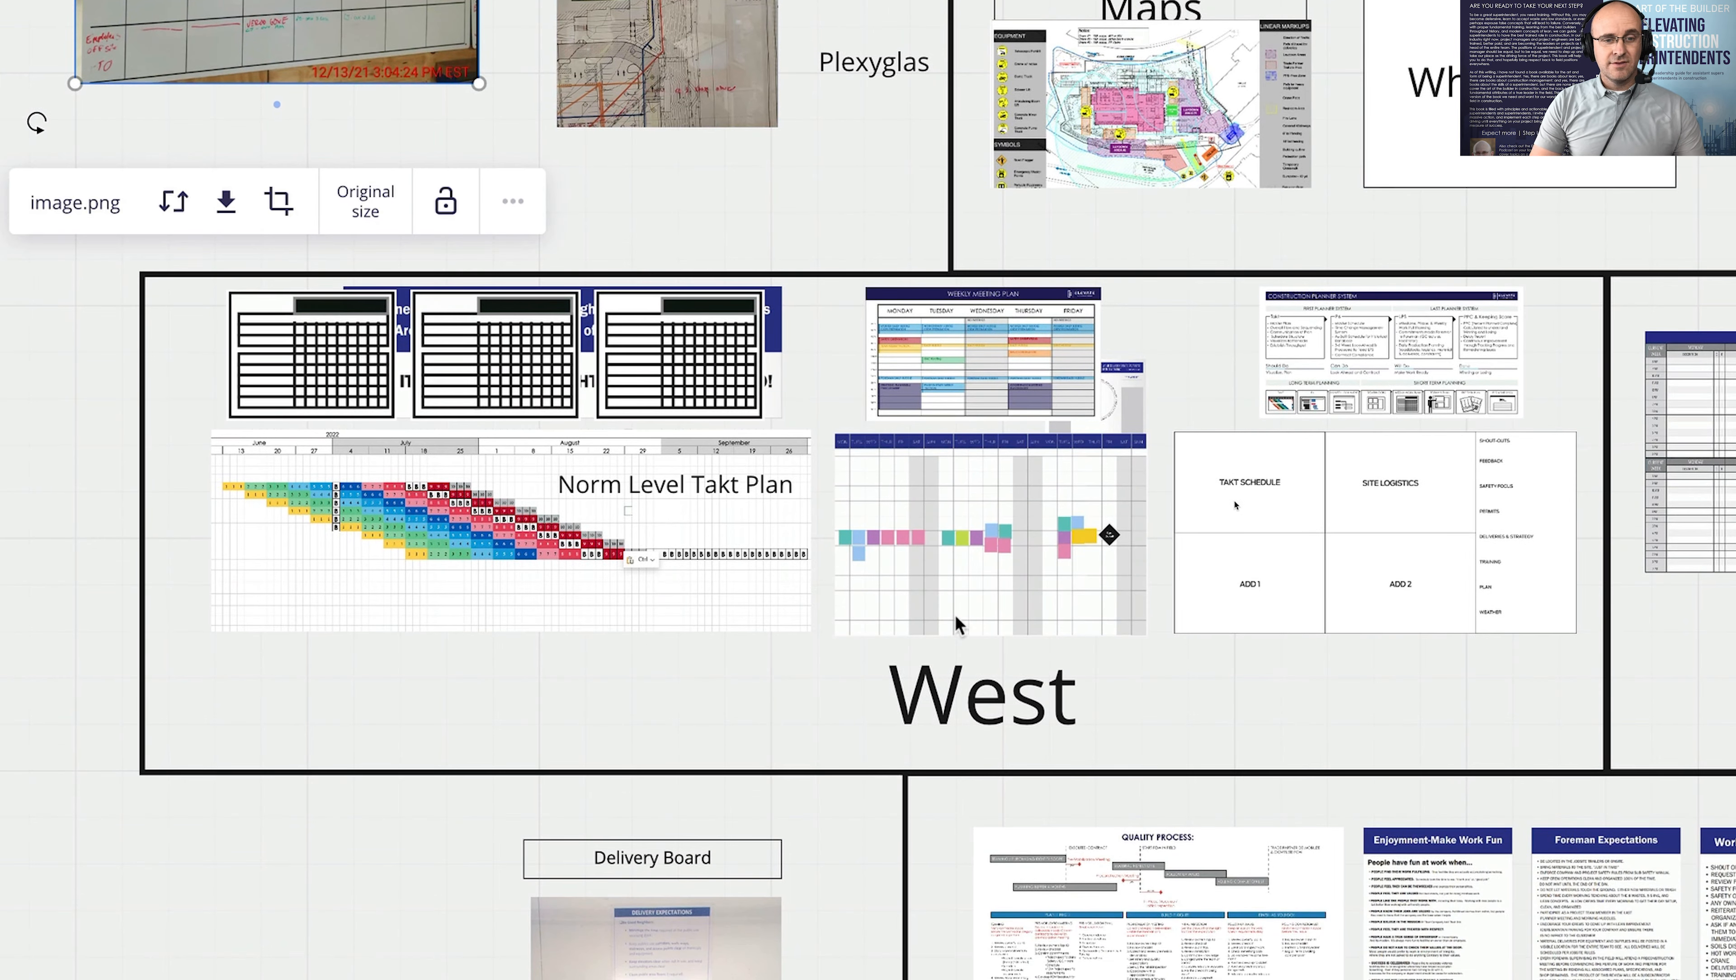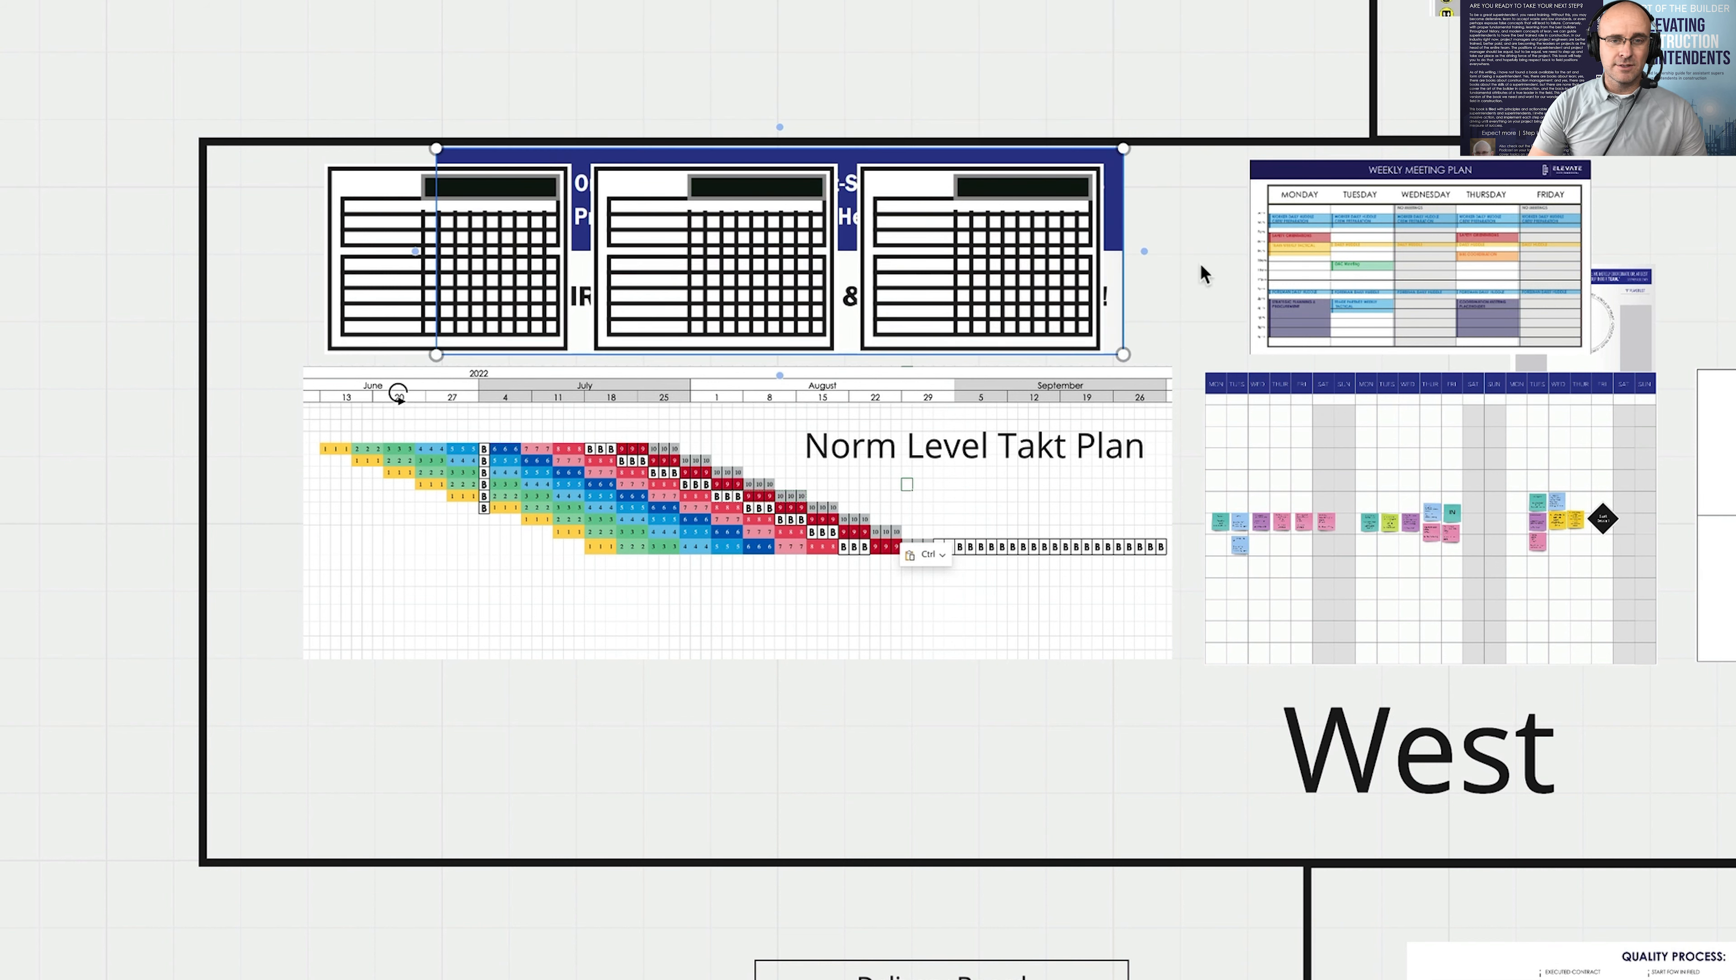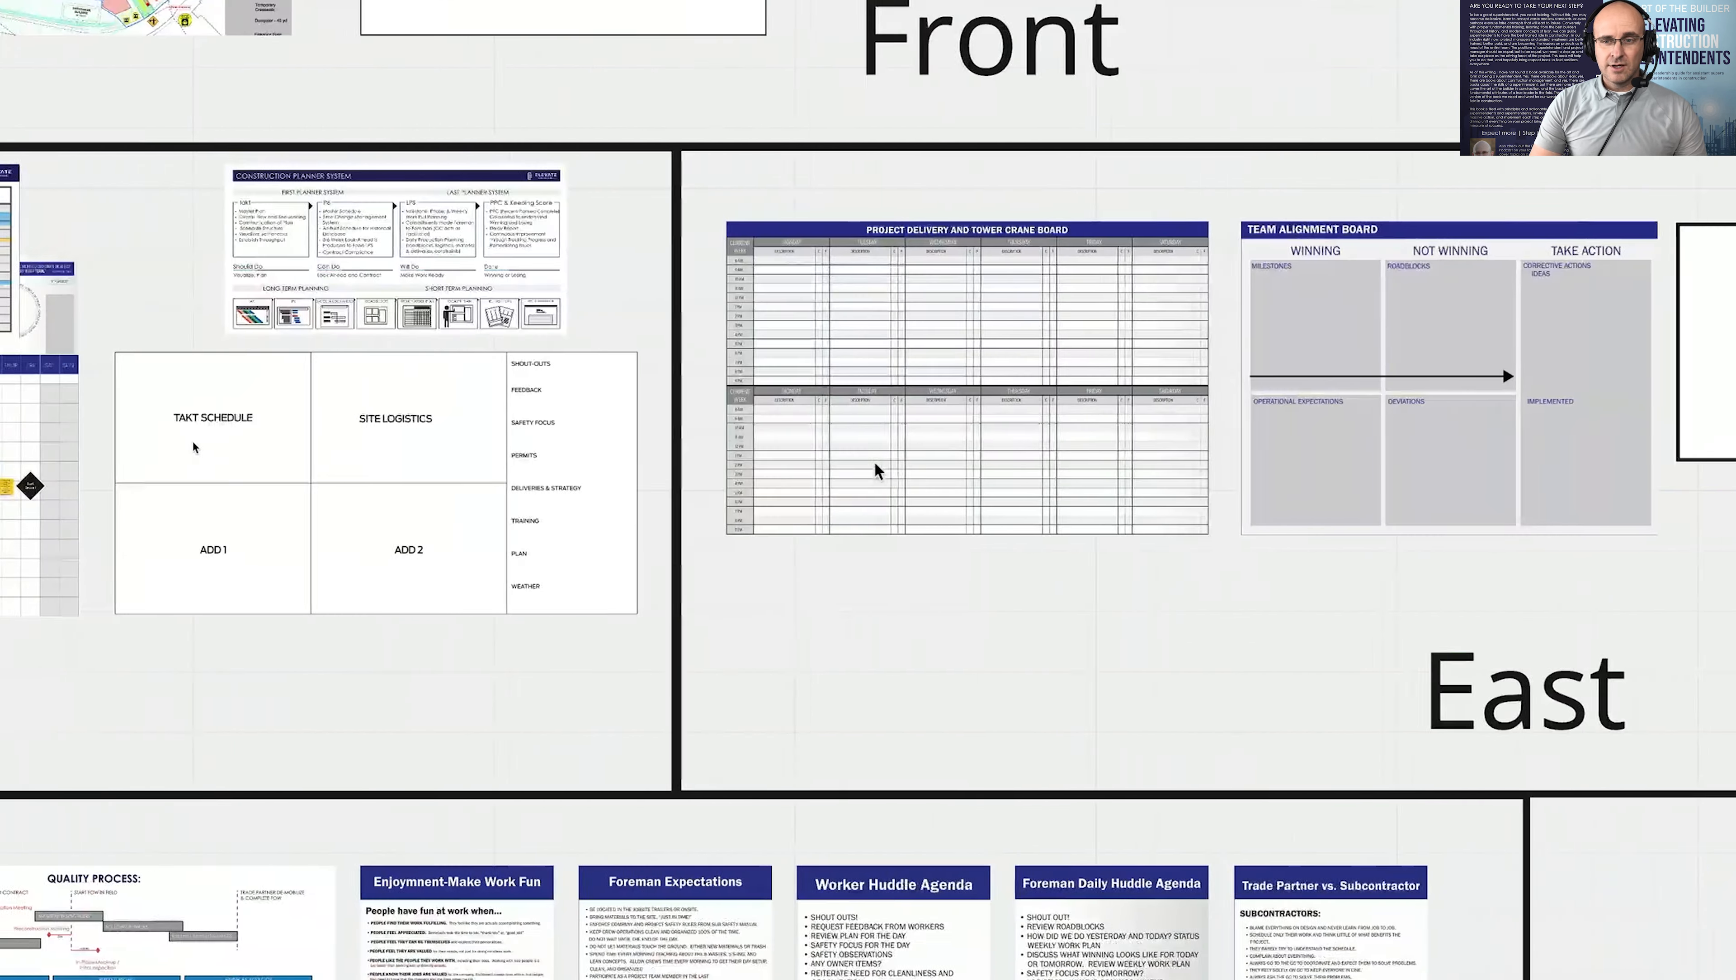On the left side of the office, I would definitely have my norm level schedule, my six-week make-ready look-ahead plan with calendars up here at the top. Possibly if I didn't have my calendars, I would make sure that I had a nice little rally cry banner here up at the top. I would have my weekly plan, my pool planning area, and then my day plan. This is where the foremen are able to craft the plan for the day from the six-week make-ready look-ahead and really go out there and win.